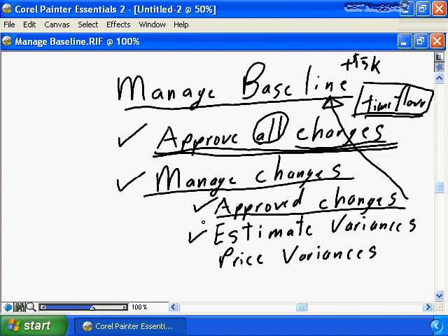You expected to spend 42 hours of labor completing this task on your project, where in fact the estimate was bad. You didn't understand the degree and magnitude of the work, and it didn't take 42 hours, it took 82 hours. It took twice as much time to complete the task as expected. That's an estimate variance because you're paying for the resource. The cost variance for that task is going to be double as well. You need to account for and manage estimate variances.